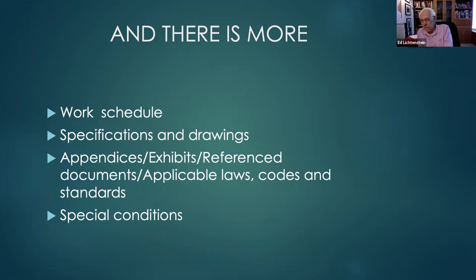And so if you're specific in your contract as to what applies, you've got arguments, you've got room to argue for the change. And there can be something that's called special conditions. And they may have something else, which says, for this contract, general condition number XYZ is modified to read. So you need to know that. Just reading the terms and conditions itself and knowing what it is they're supposed to do is not enough. Okay.